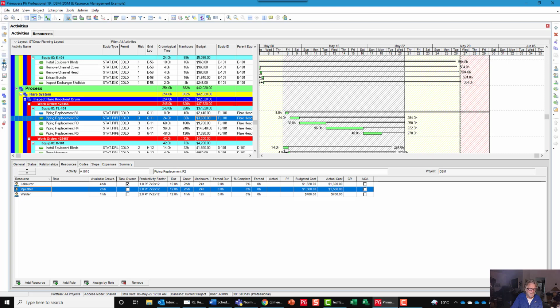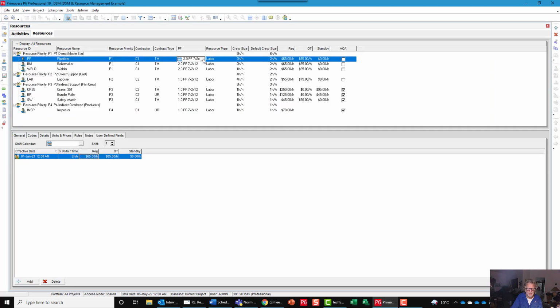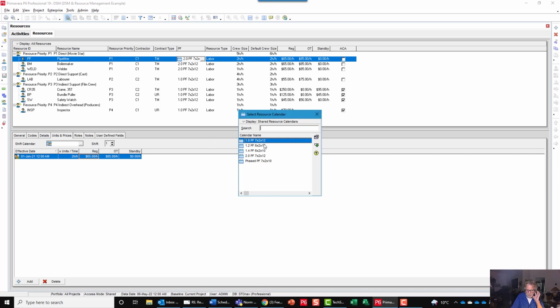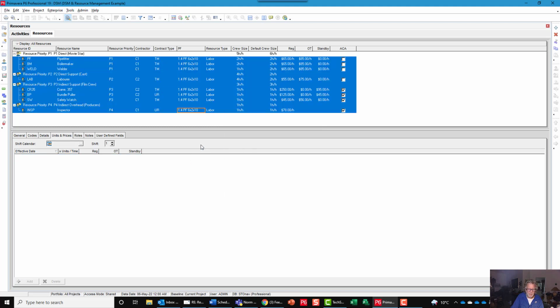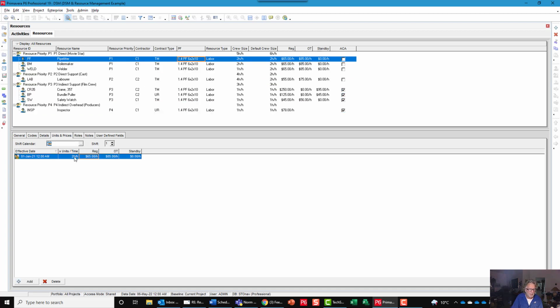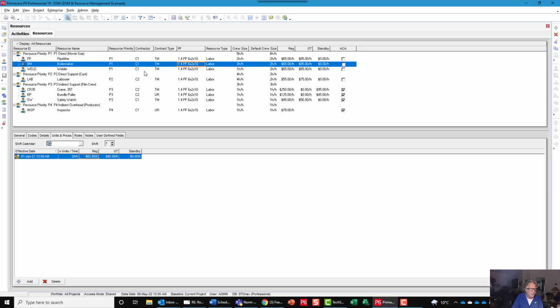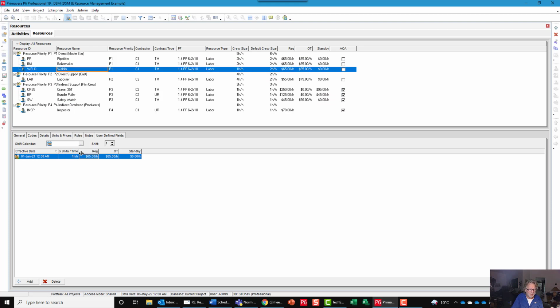Okay? So let's go back in and let me just change this productivity factor. I'm going to put a 1.4 for everyone on all of this work for now, just to test it. So I do a fill down, 1.4 productivity factor, that's on a 6x2x10. So that means I'm not working Sundays. I'm working 2 shifts, 10 hours, but I know that I can only do 60% tool time, which is fairly world class, really, 60%. So now the computer says, okay, well, how many people do you have? Well, I have 2 pipe fitter movie stars, 2 boiler maker movie stars, and I have 1 welder.